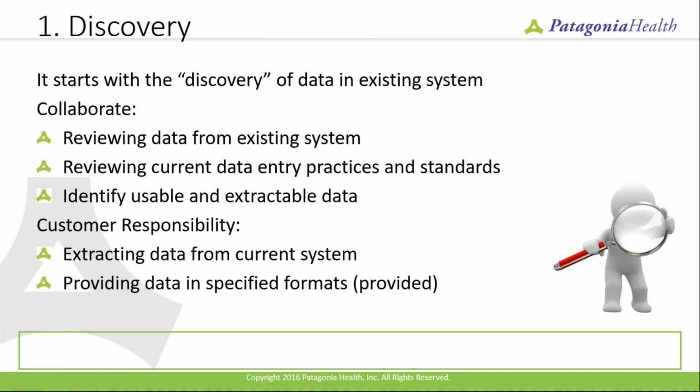Okay, data discovery, the first step. Every project begins here with the discovery phase. This is the process of the customer reviewing the data from the current system. You've got to see what data is available and eligible for potential data migration. So reviewing data entry processes and standards is sometimes useful in determining whether or not data will be complete or consistently entered by all users.